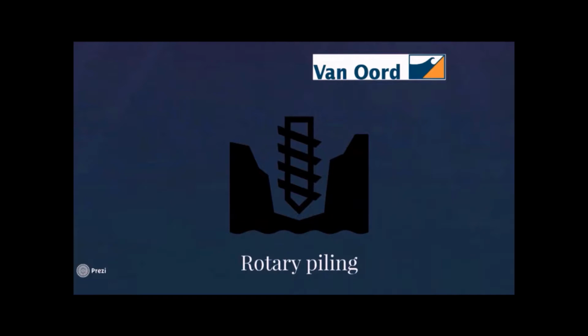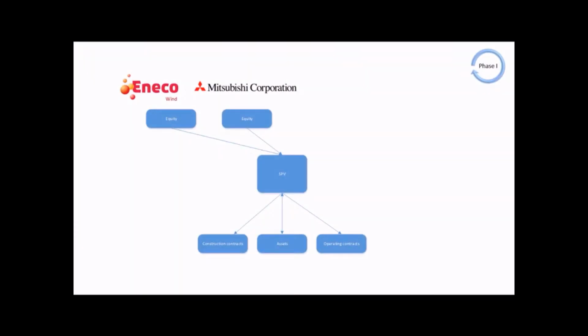This is an overview of the financial structure of the project. A special purpose vehicle, or SPV, will be founded, which will own all the assets and rights of BorWind. Thus, the risks that come with the project become isolated within this SPV, rather than possibly affecting Eneco and its partners.